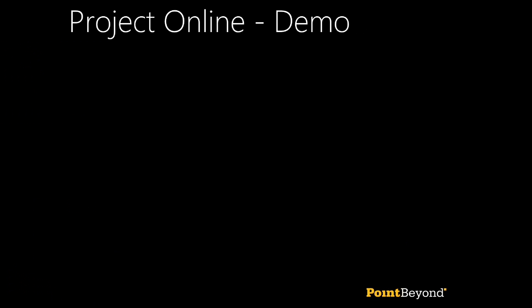Thanks, Ben. The next question is, would the create or import projects option work with an existing MPP file? If so, will MS Project 2010 files work? So will it work with an existing MSP file? Yes. So there's no file compatibility issues between Project 2010 and Project 2013. However, in order to import it, you must have Project Professional 2013 on your desktop. So the way you do this is you grab Project Professional 2013, you open your 2010 plan in there, and then effectively you save it to your Project Online system.